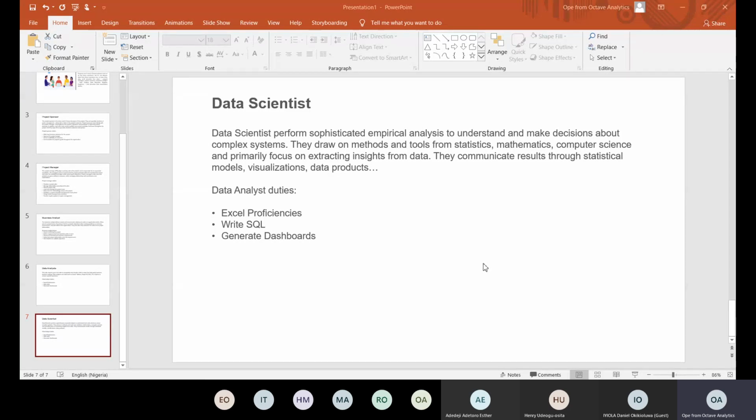If the feedback was as a result of the meeting going on now, as a Scrum Master, you can just request that the person who would give the feedback attends the next meeting, which is the following day, and give the feedback. You understand? But your aim as a Scrum Master should be that the Scrum meeting should not last for a long time. In fact, what is recommended is a 15 minutes stand-up meeting.